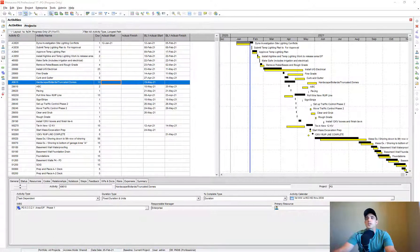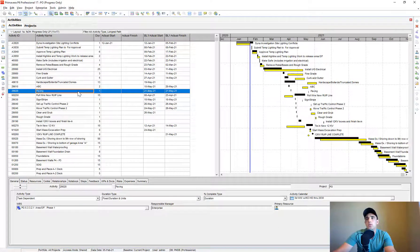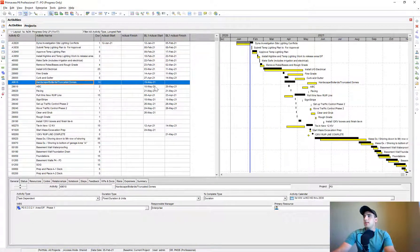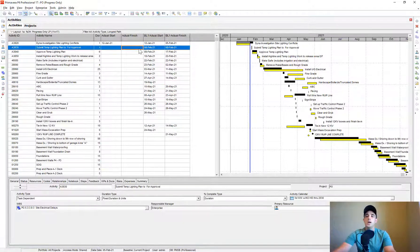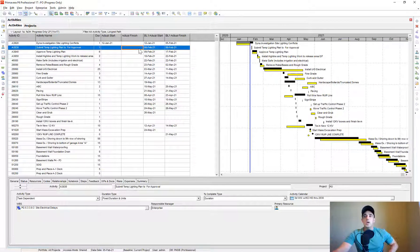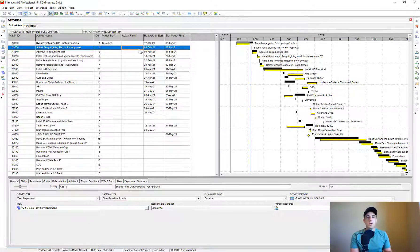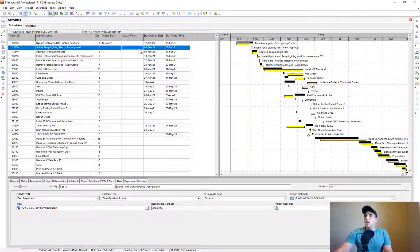Hey there, it's Pat from PJM Scheduling Services. Today I wanted to show you how to do a pure progress update using the Global Change feature in Primavera P6. Why would you want to do that? Well, let's say you have your last month's schedule and this month's schedule update and you want to see — ignoring all logic changes, duration changes, and calendar changes — what your schedule would be projecting based on just the pure progress achieved since the last schedule update.